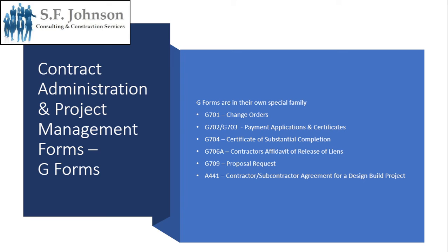There are also forms within AIA documents that assist in the administration and management of the project — specifically the G forms, which are their own special family. Key G forms include: G701, change orders; G702 and G703, payment applications and certificates; G704, certificate of substantial completion; G706A, contractor's affidavit of release of liens; and G709, proposal requests.